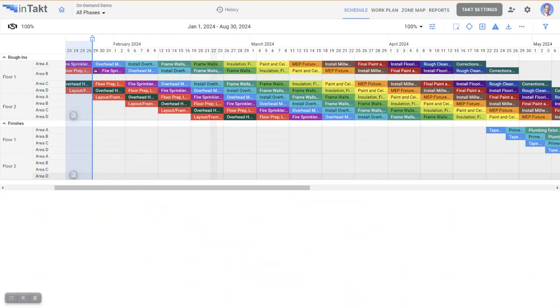But just to make things simple as well, we can simply export to P6 or Microsoft Project, and it'll come with a WBS for the zones and subzones. It comes with all the logic links, and it's actually really careful when you do the overlaps. It'll put out the start to start and finish to finish to avoid danglers, to give you really high DCMA rankings and all that on your schedule quality. So it comes out with good solid quality exports.